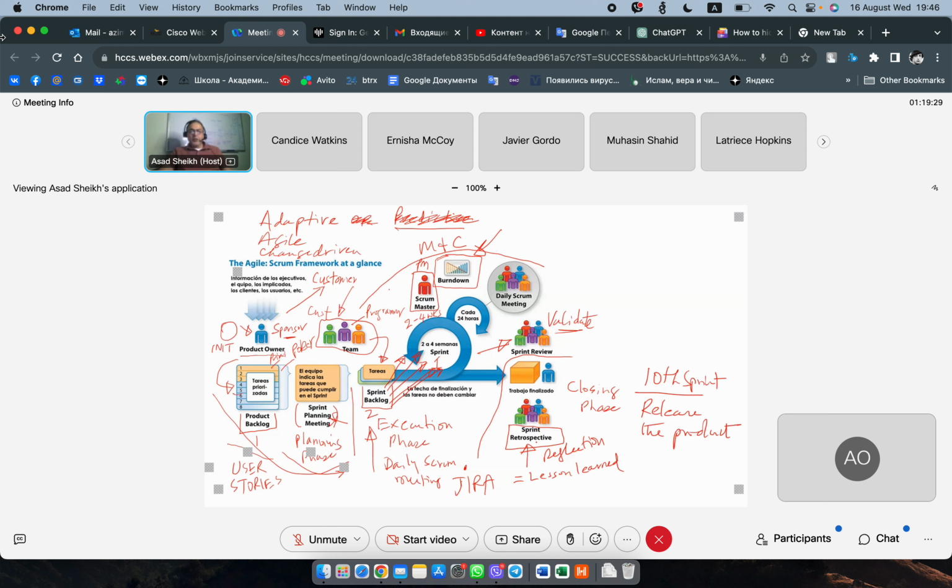But they are going to go through a sprint retrospective after every sprint. So there will be 10 sprint retrospectives. But they're not going to close it. They're just going to say, okay, sprint number 1 is done. And just to add a few more things here. Let's say they started with 5 things, right? They start with 5, and they were only able to complete 4.